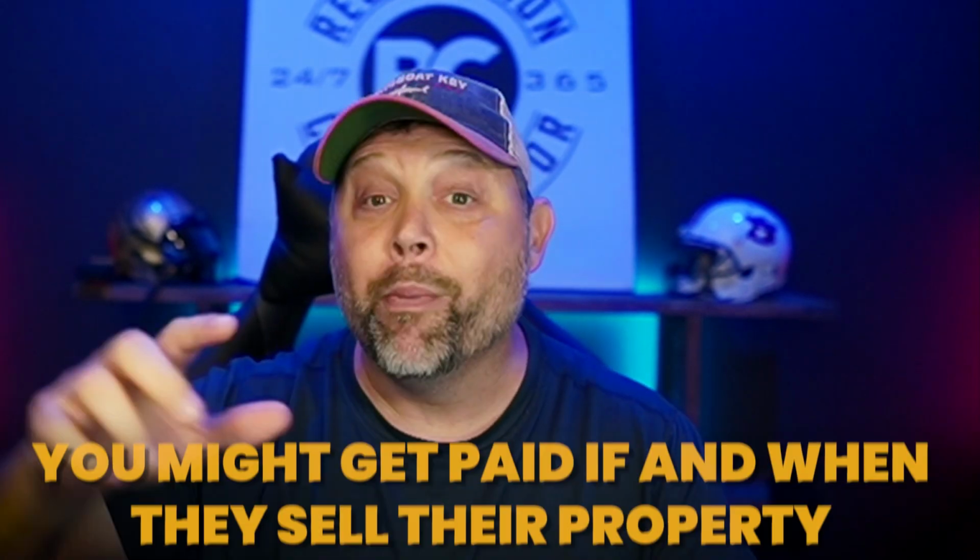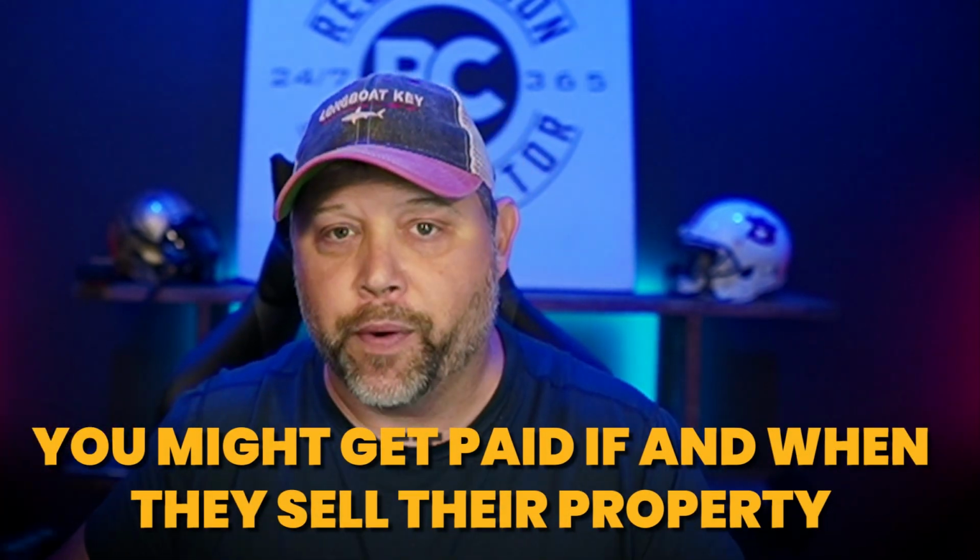Go file a lawsuit, okay? A lien is just going to state that you might get paid. I said might. You might get paid if and when they sell their property. They may live for 50 years. You don't get paid for 50 years, okay? Do you want that or do you want to get paid now? I'm telling you, go file a lawsuit. And when they get served and they got to go to court, you are much more likely to get paid in that situation. Do you understand?